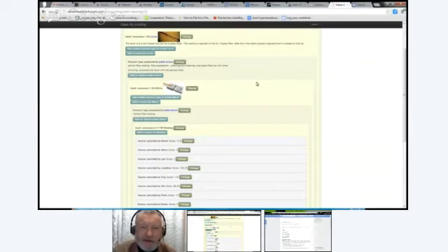But plus it's useful. One of the things, Tibi, you were asking about is, now we can have these different processes. How do we tell people can fork the processes and figure out a different recipe, a different way to do things like that? How do we figure out what's the best? There's a variety of ways to do this, but one of the ways is you can simulate it and see what would happen if we use this recipe. Well, the other one's going to take about 3 weeks longer than the first one. Maybe we want to use the first one.